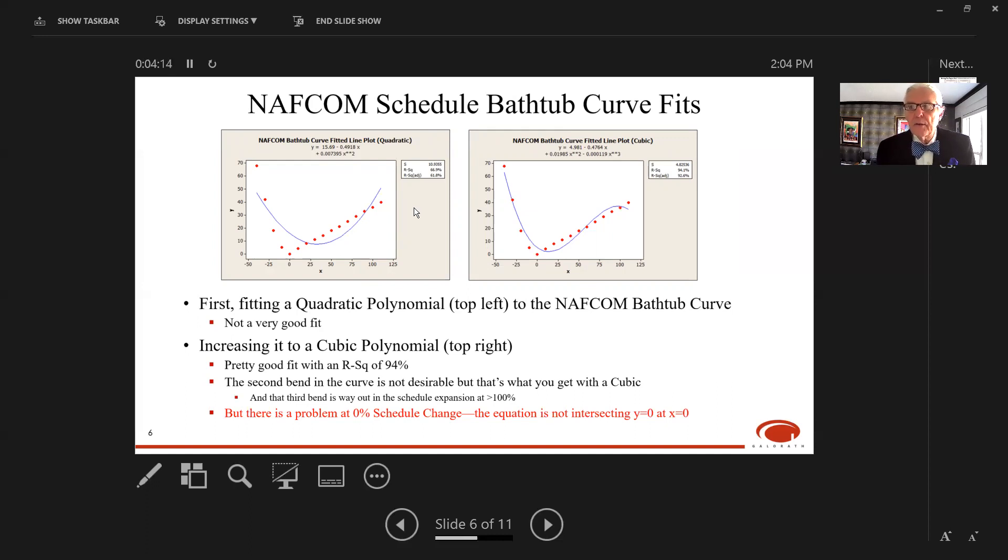There's another problem at zero percent schedule change. At zero percent, you're theoretically at the optimum schedule, the bottom of the curve. You would like your model to predict no cost impact, but we're getting a small cost impact. We're not getting Y equals zero at X equals zero, so we're going to have to worry about that.